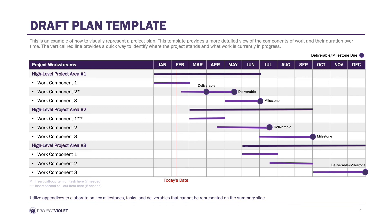This next template provides a more detailed full view of the project plan. You can actually see a breakdown of work and the duration of those items. One key piece of this slide is that red line that cuts down from the plan from top to bottom. This signifies where we stand in the project and it helps you quickly decipher all the work that is currently in progress, what is complete, and what is coming up.